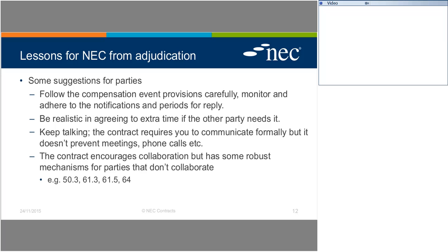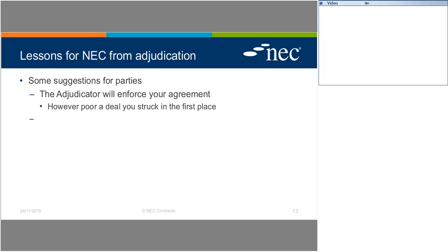Of course, the first one there is the 25% retention from the contractor in the event he doesn't submit his first programme on time, or at all on occasions. A fairly significant disincentive against doing that. And there are other clauses in the contract with similar sanctions, designed to deter you from behaving that way.